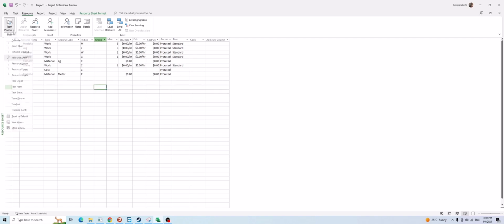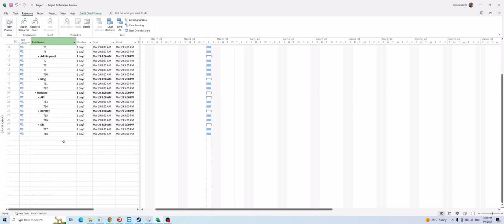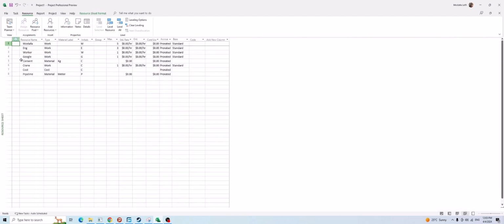You can define a milestone in your project plan to specify, okay, on this specific day we receive 3 kilogram of cement, so we can start working on task 1, task 2, task 3. On another day, we will receive 6 kilogram of cement. You define it as a task and as a milestone. You are not going to define it inside of the resource sheet. I personally prefer Microsoft find a solution for this one, so you can define it also here on the resource sheet.